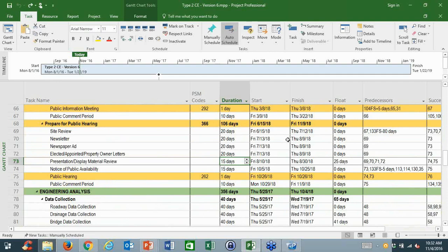Just wanted to emphasize the point about the dashboard. The whole point of all this is that the dashboards will use the PSM codes to pull the schedules that you have put in to populate it. So it's very important, for your benefit also, to make sure that what is in the schedule is accurate, the PSM code is accurate, because otherwise it's very possible that the dashboard may be pulling in incorrect information and may look like you are behind schedule. And that dashboard will be reviewed by the executive board every month.